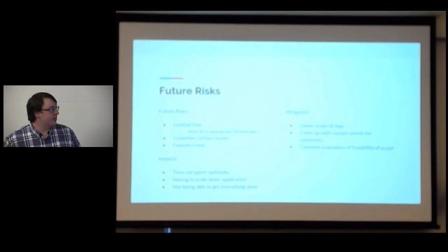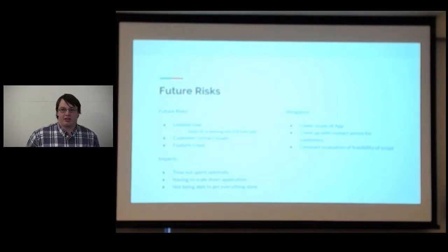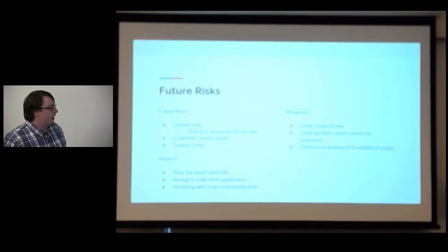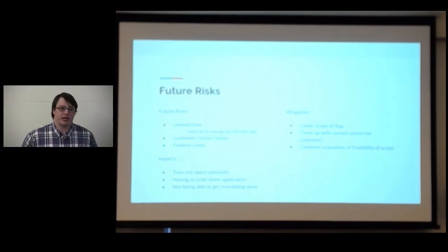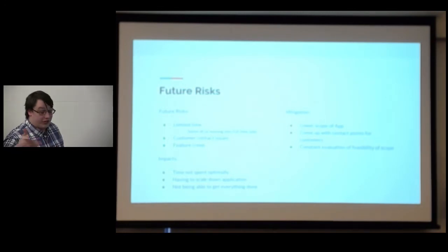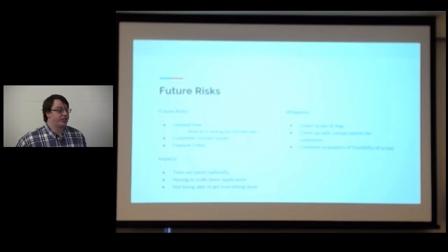Some mitigation steps are to lower the scope of the application, to come up with contact points for the customers or for the universities, and to have a constant reevaluation of our scope and its feasibility.